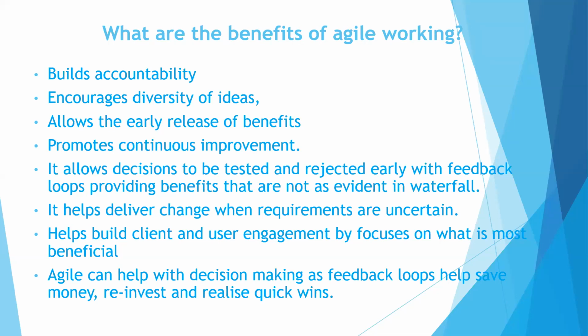So Agile promotes continuous improvement. Why? You are getting feedback all the time. At the end of every 2-week sprint, the team will meet in what we call a retrospective to look at what we have done fantastically, what are the things we didn't do very well, and what are other things that we've not even done that we can add. At the end of every sprint, they are getting feedback from the team, from the product owner, from the business, to make them better. So it promotes continuous improvement. It also allows decisions to be tested and rejected early with feedback.